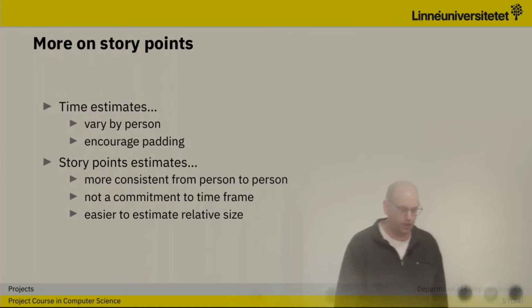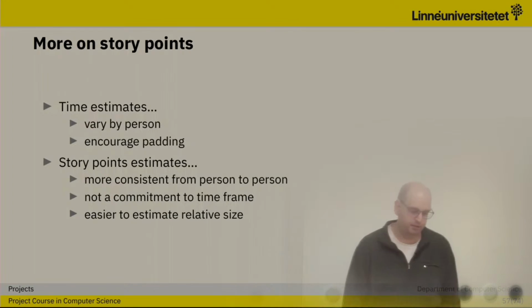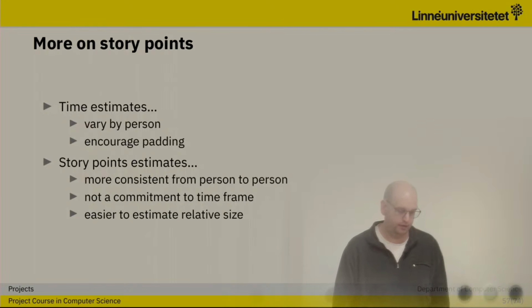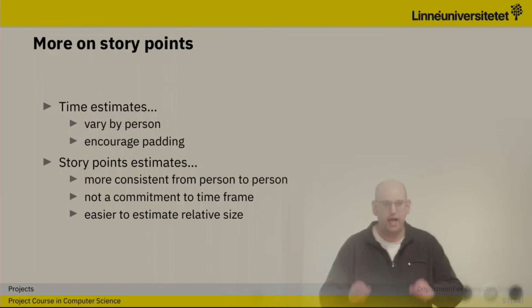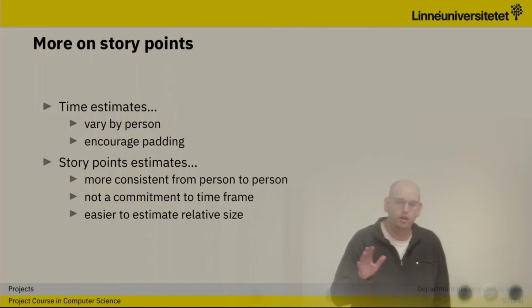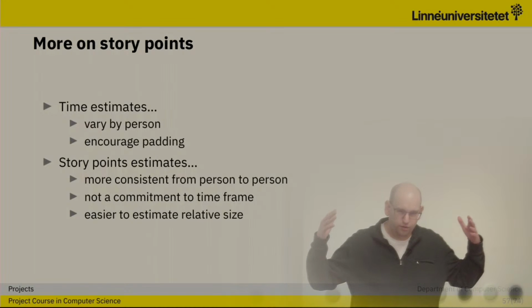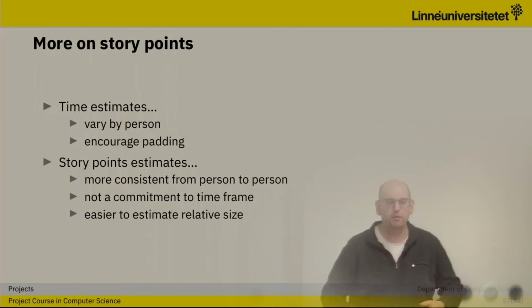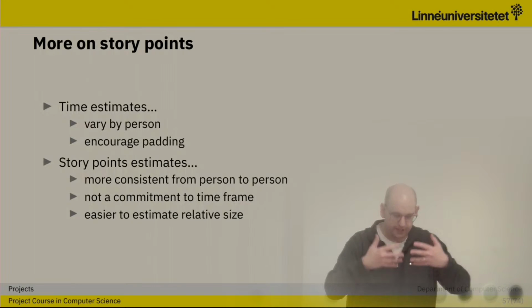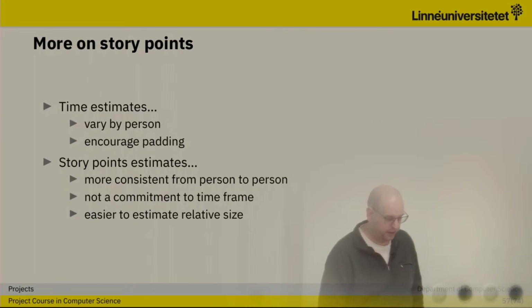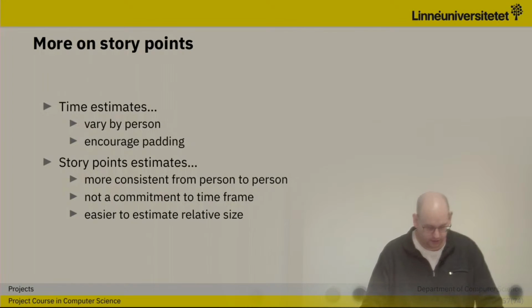And why not time? Well, because time estimates vary by person and they encourage a little bit of padding around it. Also, deadlines are difficult because then you try to streamline your work towards the deadline instead of making it done, so to say. So you work towards the deadline instead of completing the user story.